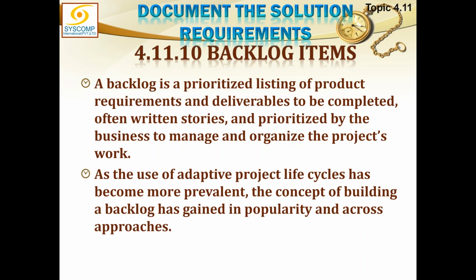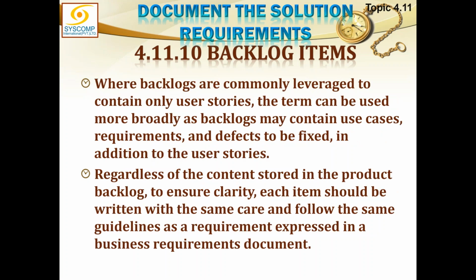As the use of adaptive life cycles has become more prevalent, the concept of building a backlog has gained in popularity across approaches. While backlogs are commonly leveraged to contain only user stories, the term can be used more broadly, as backlogs may contain use cases, requirements, and defects to be fixed in addition to the user stories.